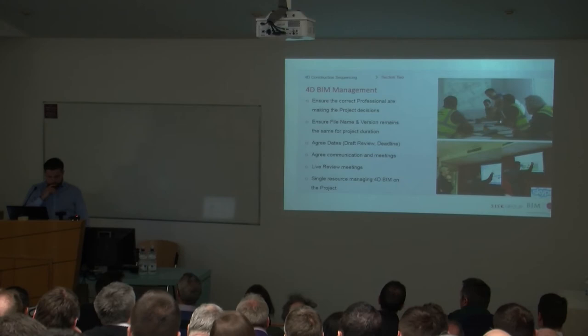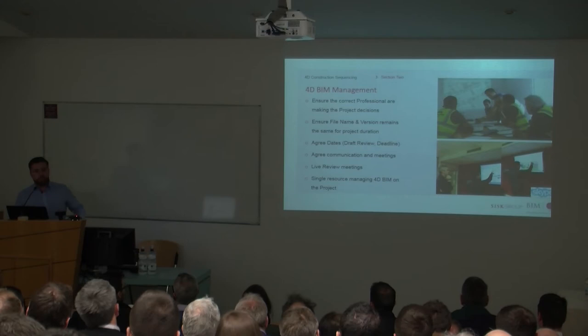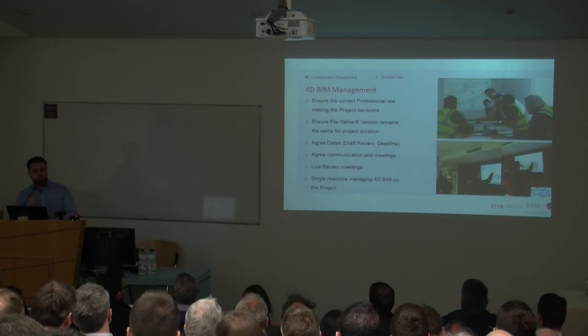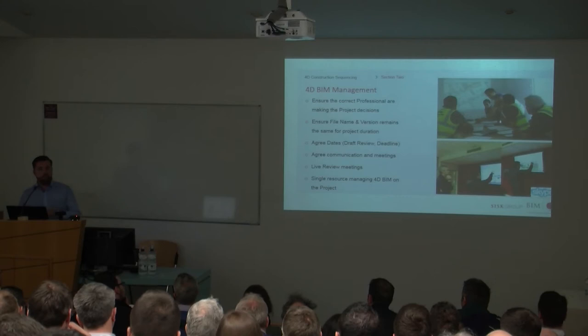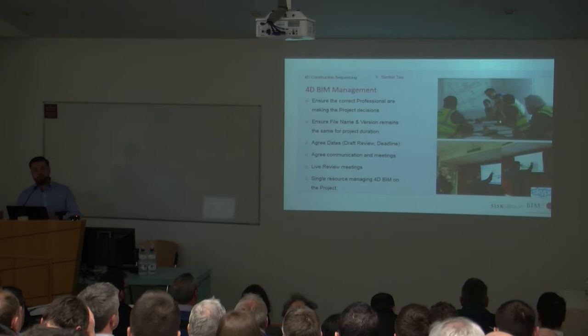The next thing will be agreed dates, draft review, deadlines. In some cases we might have a 2 week turnaround, but ideally you'd have a 6 week turnaround for a 4D construction sequence or a detailed construction sequence. You'd outline when I'm going to get my construction program, when I'm going to get my construction methodology, and whether I have a 3D model to start with, and if I don't, how long I need to develop that 3D model. These are things you'd sit down and map out at the start of the project, and make sure you're tracking right throughout the job.